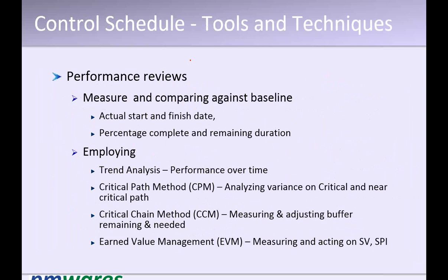There is an integrated change control process, right? Correct. That addresses the change in the scope, and it addresses these changes also. Any change there. But these changes which are being suggested as an output to various processes are internal changes. They are preventive actions, corrective measures, and defect repair. They are not change in scope. It is not the same as the change request we normally use in our day-to-day life. Our change request means change in scope.